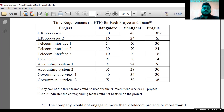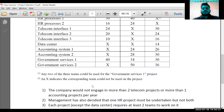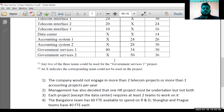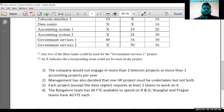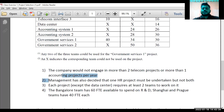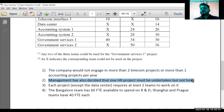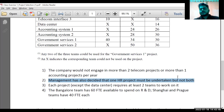An 'X' indicates you cannot use that team for that particular project. Also importantly, management has decided one HR project must be undertaken but not both.